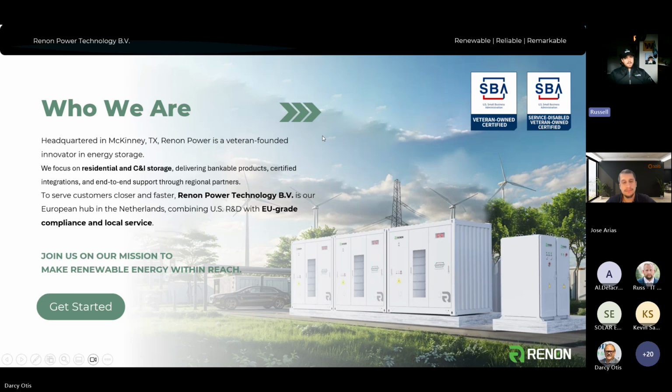One thing I wanted to jump back to, that we mentioned, is creating ongoing value for our customers and really improving that ROI. A campaign that we are launching this year is that for any projects we deliver, we're not handing off the project just when we get to commissioning. We'll support all the pre-design work and the commissioning process, but then once a project is commissioned, we're looking to follow up on a 30, 60, and 90-day timescale.